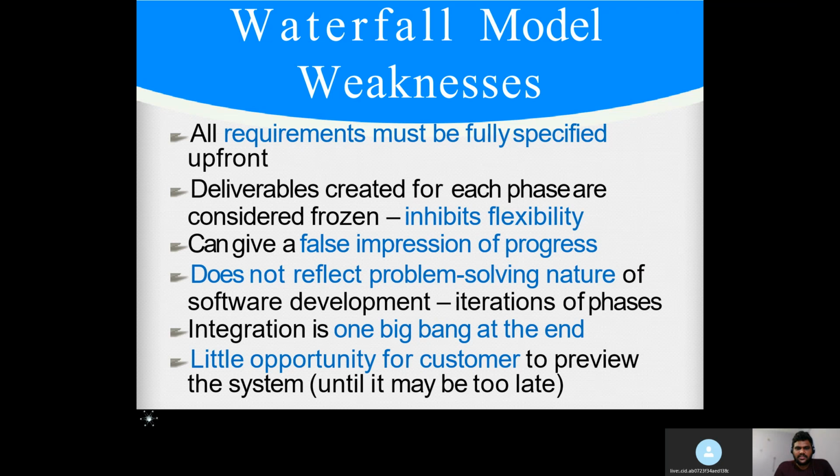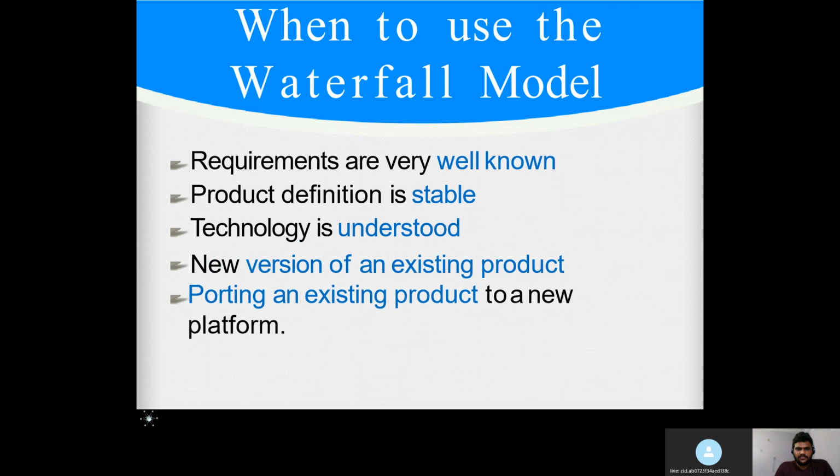Integration is one big bang at the end. If the integration fails, then we need to follow the process again from the start, where the cost will double for the rework of everything, and time is lost. There is very little opportunity for the customer to preview the system. The customer cannot see any demo until the end, because the application will only be up at the end phase after testing.